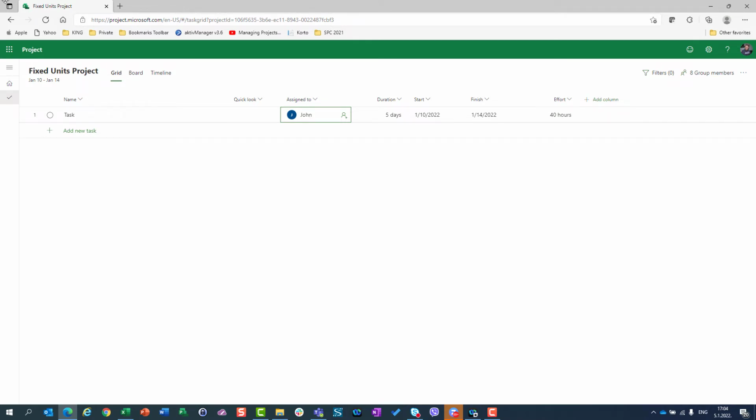But since this is a fixed units project, if I say 6 days, in these 6 days the amount of work will increase, because John is supposed to work 6 days, 8 hours per day, and this will be 48 hours.